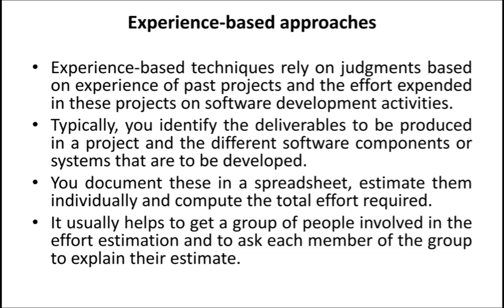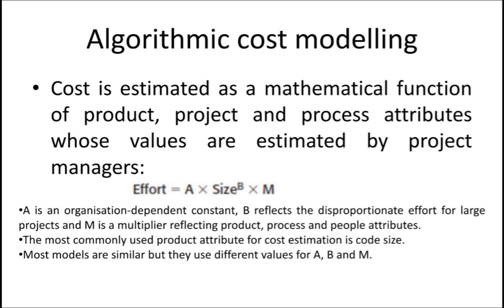It also usually helps to get a group of people involved in the effort estimation and to ask each member of the group to explain their estimate. This is a good idea. We can ask each and every person related to the project to calculate the effort estimation. Each member will come up with their ideas, and based on that we can take a decision.